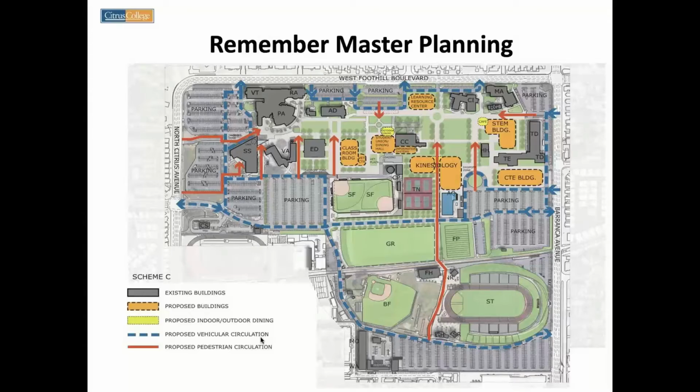The diesel program could easily be taken care of in the other technology engineering or technology development building. With that being said, it makes a whole lot of sense to go ahead and raze that building. While CTE is being constructed, the impact to the campus would be minimized. Yeah, there would be power shutdowns and stuff like that, normal course of business.